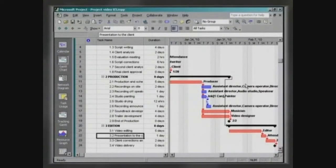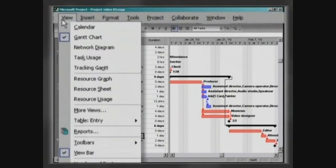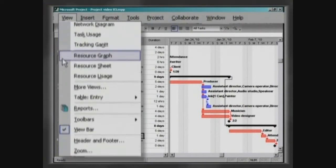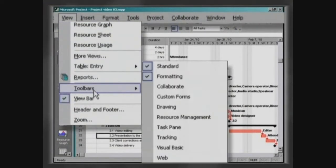After concluding the allocation of resources, the project manager will have to check to see that the resources are not being used in an amount that exceeds their capacity. Every time that a resource is being utilized above the required capacity, there is a superallocation of resources. Click on View, Toolbars, Resource Management.